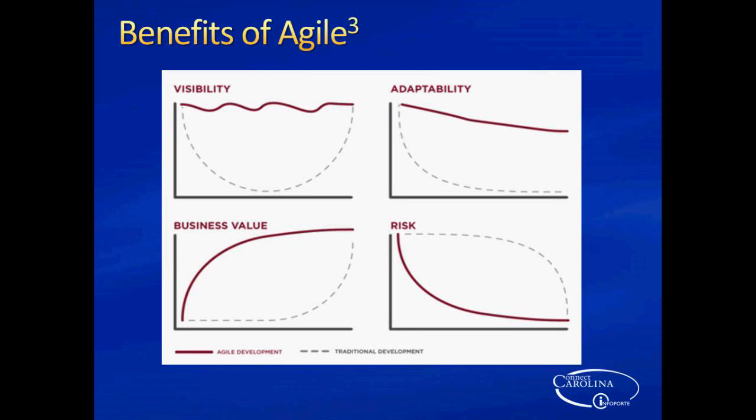So what is it about Agile that increases visibility? You're working together with the customer pretty much from the start continuously. Right. In Scrum, we do it with what? Every day, we meet every day. But not with the customer. Right. So we have a 2 week, make this up, 2 week sprint. At the end of the sprint, we do about 3 things. Demo. That's right. We do a demo to the customer. This is what we've accomplished in this sprint.